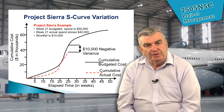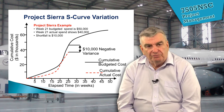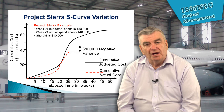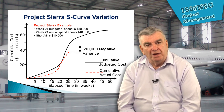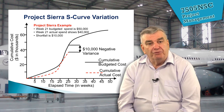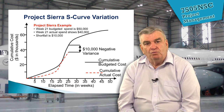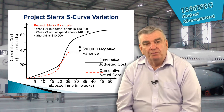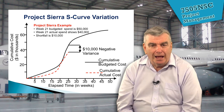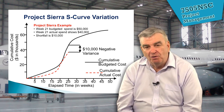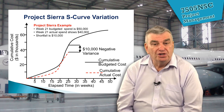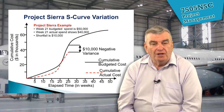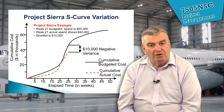Let's take a look at some of the different tools we use. For example, we'll use the S-curve, which plots elapsed time against cumulative spend from the budget. In this example, at week 21, our budgeted spend was $50,000 but we've only spent $40,000. Some people might say that's good — you haven't spent as much as you planned. But as we'll find out, that may not be a good sign. It may simply mean we're behind schedule or haven't been able to spend the money at an efficient rate. So while the S-curve tells us that we've got variance, it doesn't tell us why.